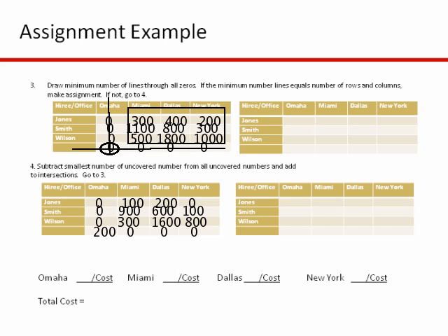We're going to draw the minimum number of lines to cover all zeros. And if those equal 4, then we can stop. We can make the assignment. If not, we have to go back to step 4. All right? So if I do that, again, I have a line there, and I have a line there. And then let's say I have a line there. Okay, so now I have 3 lines.